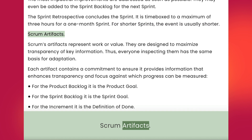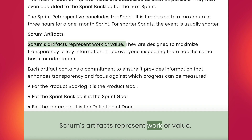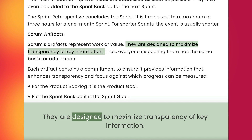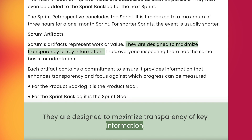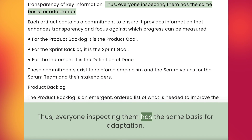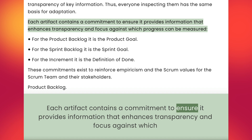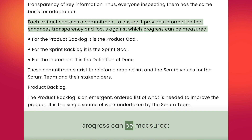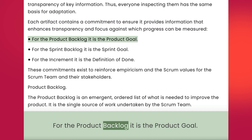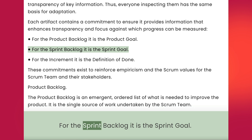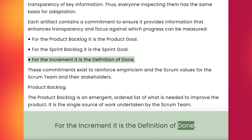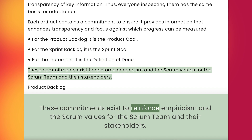Scrum Artifacts. Scrum's artifacts represent work or value. They are designed to maximize transparency of key information so that everyone inspecting them has the same basis for adaptation. Each artifact contains a commitment to ensure it provides information that enhances transparency and focus against which progress can be measured. For the product backlog, it is the product goal. For the sprint backlog, it is the sprint goal. For the increment, it is the definition of done. These commitments exist to reinforce empiricism and the Scrum values for the Scrum team and their stakeholders.